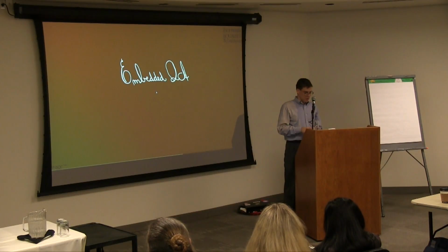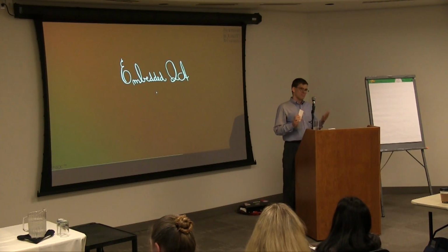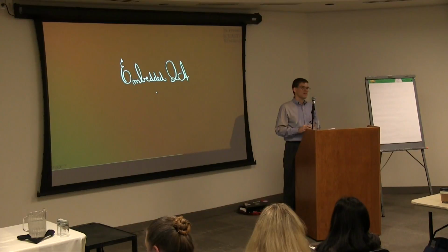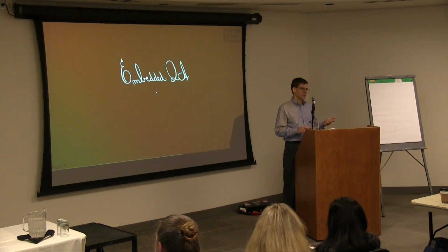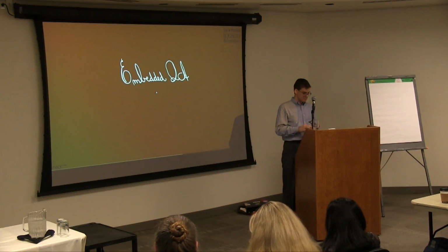So in the winter of 2014, the engineering leadership at Puppet reorganized the engineering teams as a whole, knowing that the Agile Fall methodology was not serving us or our customers as well as it should be. So at that point in time, the Scrum teams got embedded QA, they got embedded docs representation, they got embedded UX. So the entire team was then responsible, in a true Agile fashion, for the quality, and responsible for the user experience, and responsible for making sure it was adequately documented for the customer.